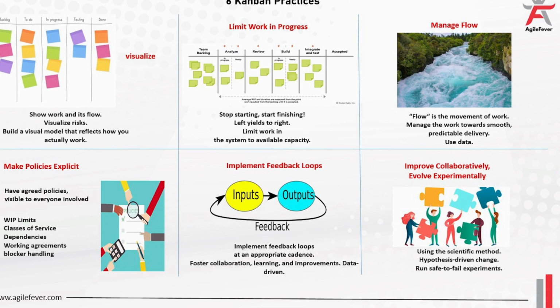The cards that you see, the board that is set up on the top, is called workflow. You can set up that workflow: the backlog, to do, in progress, testing and done. It's a workflow that you have to set up for your own team. It differs from team to team. You have to choose on that, and then you also see different colors of sticky notes there. Could be different, right? Could be a task, could be a bug, could be a story, could be something else, right? How do we know?